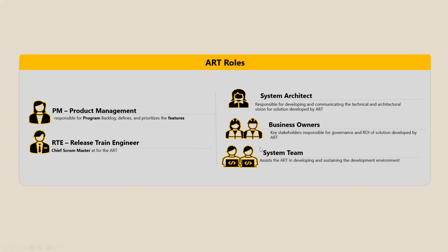Last but not least, we have somebody called a system team. Because it's not a single team, there are multiple teams. You have to integrate the work of multiple teams, plan, and integrate it using tools and methodologies, whatever you use in your teams. If the individual teams do not have capacity, which is time, or the skill set, which is technology or know-how of tools for integration, or lack time for integration and end-to-end testing, that's when the system team steps in and helps the team so that the lack of capacity and the lack of knowledge can be managed. But you cannot take the system team for granted. As the Agile release team matures and moves forward, you should take care of the things that the system team is taking care of, and accomplish it within your team.